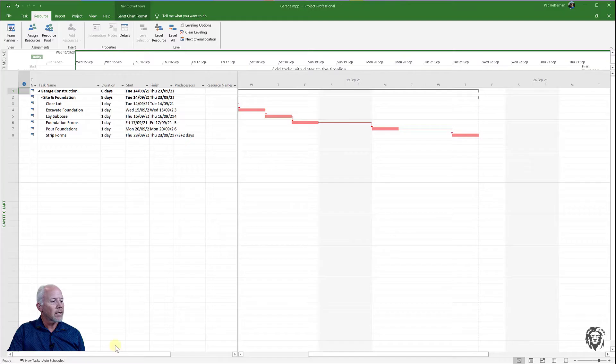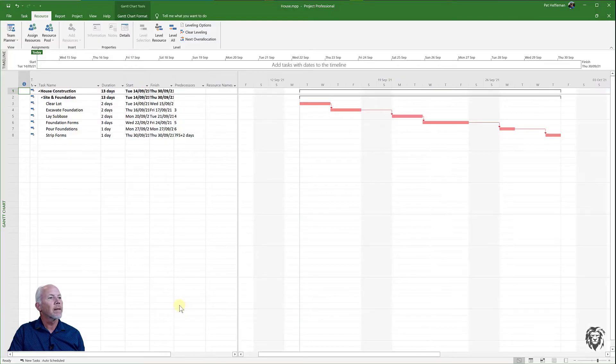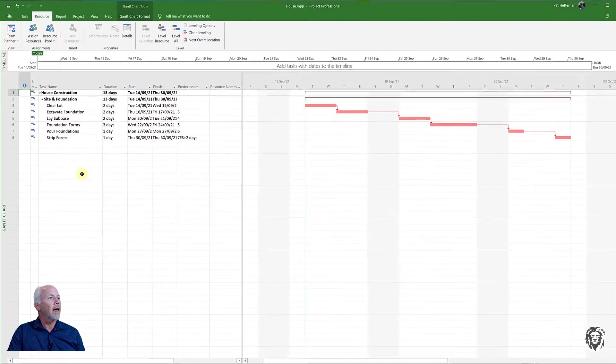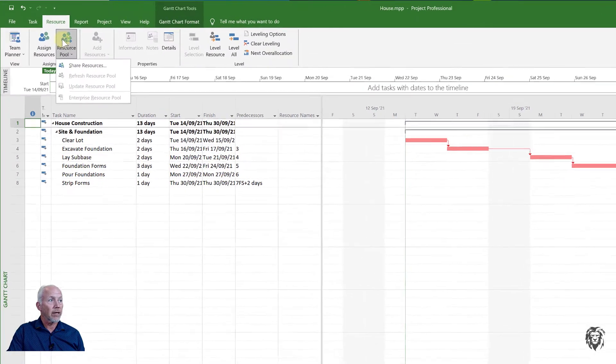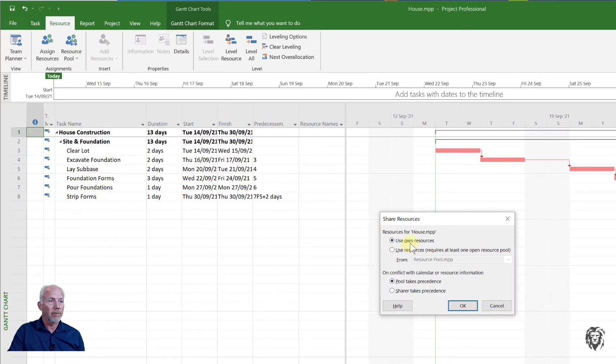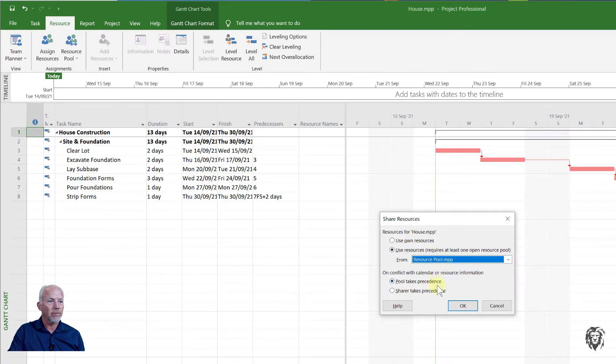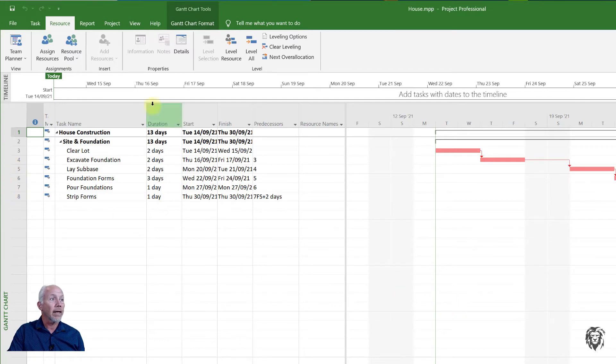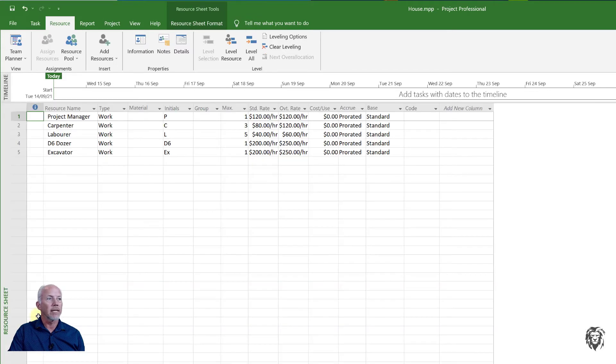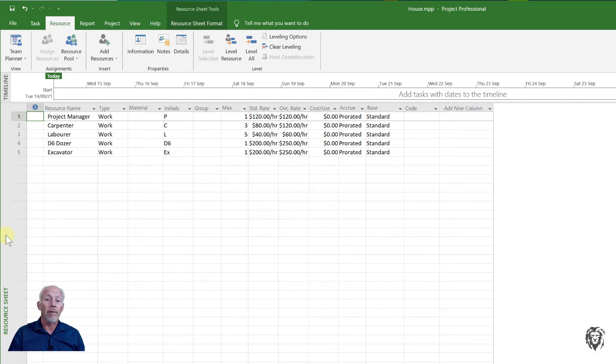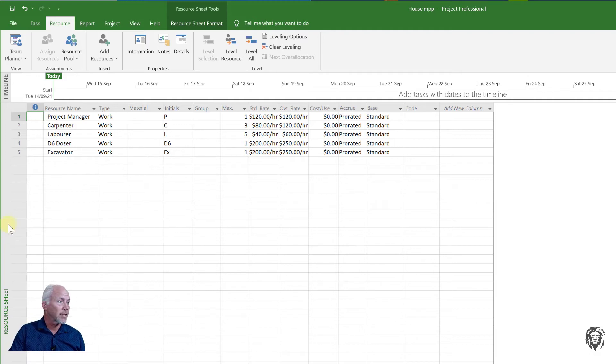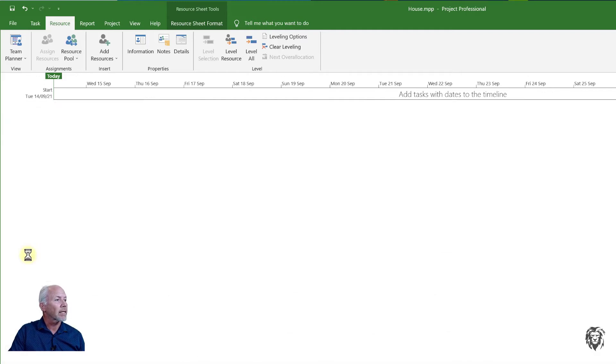I'm going to pop over to the house project and do the same thing. I'm going to go to the resource pool, choose share resources, use resources from the open sheet, choose resource pool, let it take precedence and hit OK. If I go to the resource sheet you can see now I have access to those same resources.